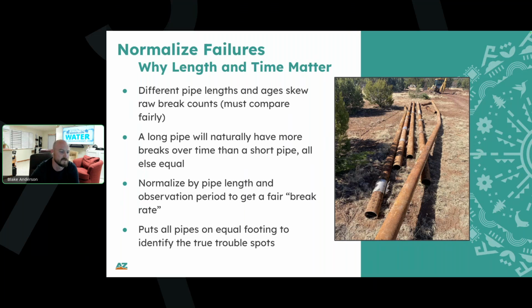And so you spend $12,000 repairing a section of main that would have only cost you $5,000 to replace in the first place. And so the total cost to repair combined with the cost of replacement, because you have this sunk cost into your initial repairs, is now over $17,000, which means that the status quo of patching this stuff ultimately ended up costing 3 times as much as it would have been just to make the replacement, once we realized that there was a problem.